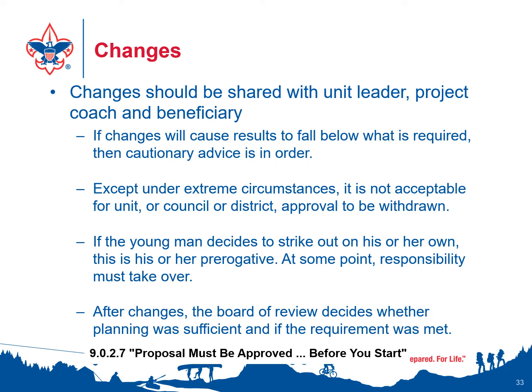The scout should go back to the approver and get another approval for this new project because the project scope has completely changed. If the scope of work is drastically reduced, then the scout should go back and get approval before he goes to his board that reduction in effort is okay.